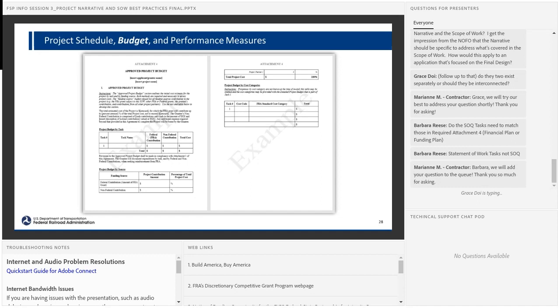But this is where you simply take the tasks as listed up above in the description of work and budget funds for them. There's one column for the FRA contribution, another column for the matching non-federal contribution, and then total. If, for example, you have different subtasks under your construction, then break those out in the budget as well.